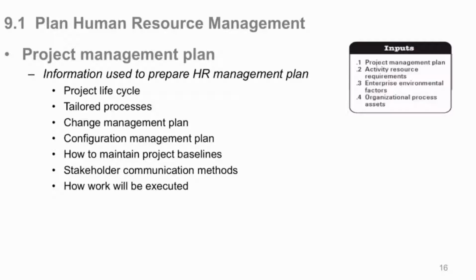Your change management plan, because as strange as it may seem, as we'll see, when you change your staff around, you bring people on, you take them off, PMBOK, as best practice, recommends that you issue a change request to do that. And it's not that the change control board necessarily would reject that you're putting this guy on or off, although it could be possible if he's an important enough person. But generally, in change request, you have a continuous log repository of all changes to the project, no matter what it is. So that could be an instance where, remember those 5 change request types: corrective, preventative, defect, enhancement, and update. It could be an update, perhaps, that you're updating your plan because you're changing people around. But at least you have a record. So they do say you still do need to have a change request when you move people around from your project.